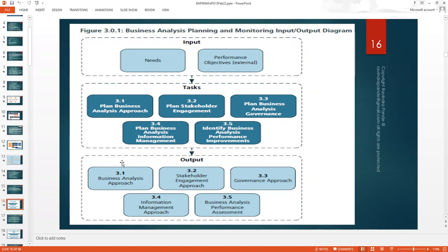The second thing, plan stakeholder engagement. So first, I'll identify stakeholders. VPHR is my product owner. Then I'll talk with the HR manager about what type of details they need for attendance, where the historical attendance records are, how we can convert them to digital, and whether they were using any software previously. Normally, all these older companies have these ledgers entered by a data entry operator into a system, might be an ERP system or an intranet system or something like that, where I can just get that data and insert it into our system and start working on that. So I need to plan the stakeholder engagement: whom to meet, when to meet, what's the best way to meet. Should I meet in the evening, afternoon, lunchtime, dinner time, wine time, and so on and so forth. So these are about planning stakeholder engagement.